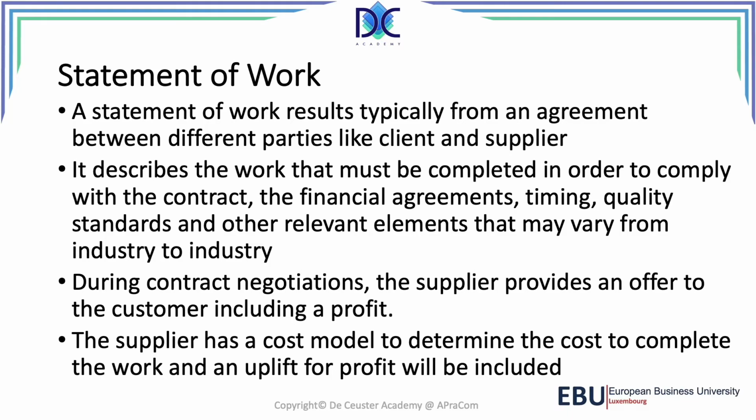Now, when you're providing a typical service, you have cost factors, how to create the work, how to do certain activities. And when you evaluate your offer, you make a calculation on how much you think the project will cost you. You add a profit, and with that profit, you have a margin of negotiation.